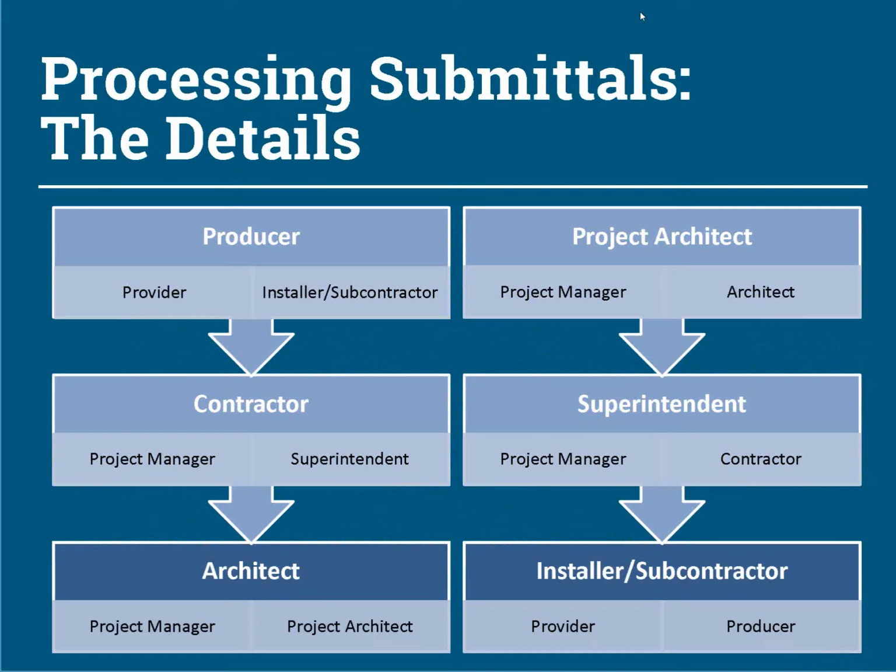And I won't spend a lot of time with this, but basically from the producer of a particular product through the contractor's hands first, project managers and superintendents, to the architect, whether that firm has project architects, managing architects, perhaps through the superintendent on the project to make comments about specific field measurements, installation techniques, and then to the installer to use in actually performing that work.